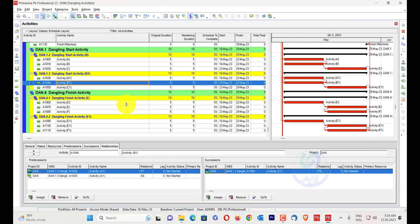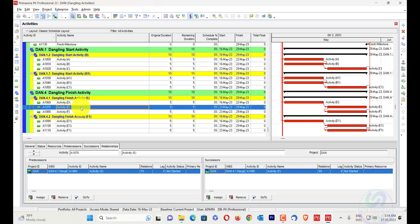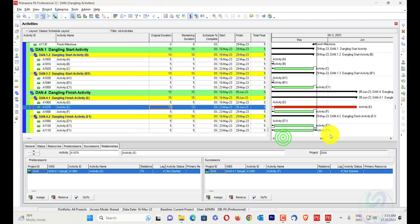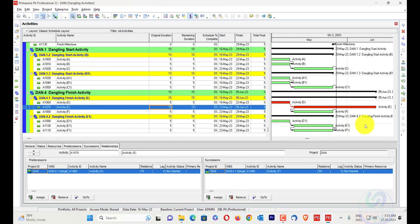Now I will discuss dangling finish activity. Here the dangling finish activity is activity E. In its successor there is a start-to-start relationship. If we increase the duration of this activity — for example, to 10 — you can see that its upcoming successor activities do not have a link with it.